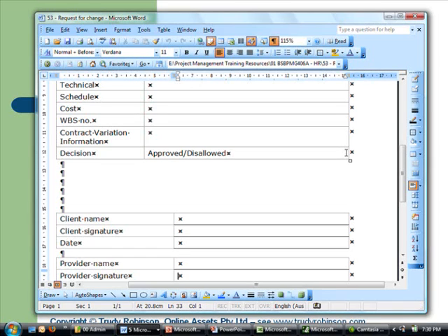If you've designed your project plan properly, so you've identified exactly what you're going to do, what budget you've got, who you're going to get to do it, and then you've started the work and something changes. So you've identified that there's an inadequacy in the specification, or there is a change in stakeholders and they've changed what they want. They don't want the green widget anymore, they want the purple widget. Anything like that that's going to impact your ability to deliver in full on time, you put the request for change in. Even if it's not going to cost you anything, it just covers your butt.